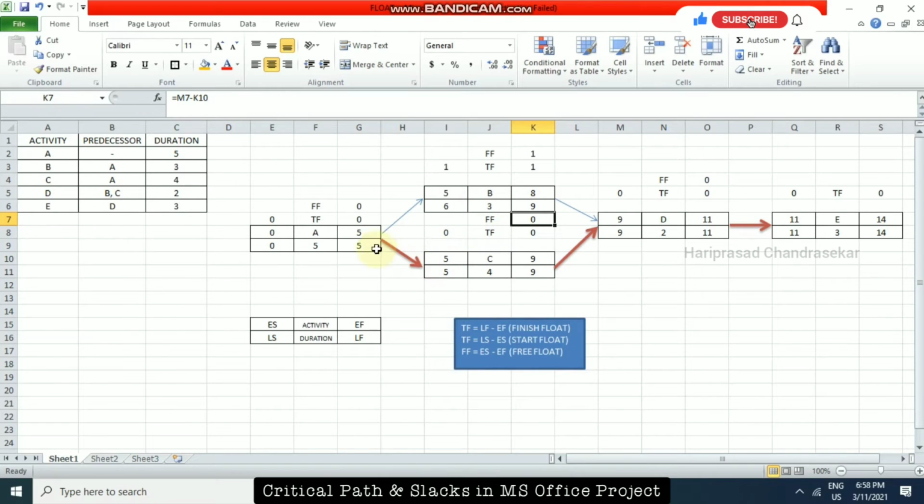So normally we will be having a critical path, which is considered as the long duration. And we will be having total float and free float as 0 for the critical path. That's why I just changed the color to red. Now you understand, na? Very simple manner.